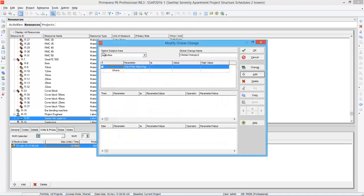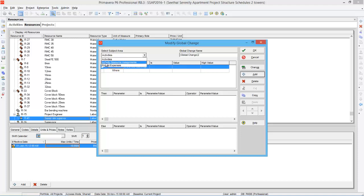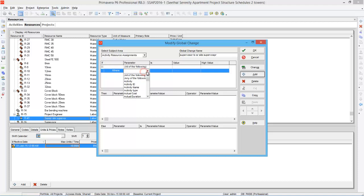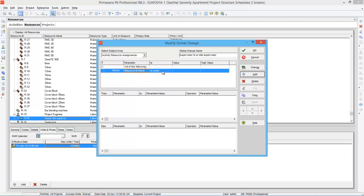Say new and first of all you have to select the subject area. So I want to change the subject area to activity resource assignment. Then give a name: supervisor to senior site supervisor.